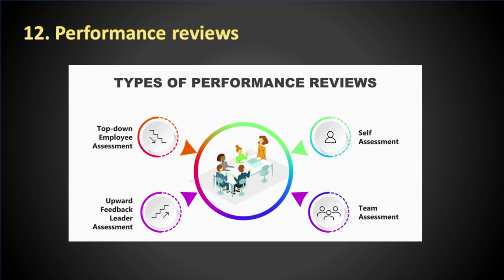Performance reviews. A technique of looking at performance figures and comparing them against expectations, as in the case of schedule performance compared against the schedule baseline in the control schedule process. In this case, some of the parameters you look at are start and end dates of activities, % complete, and remaining duration for activities in progress.